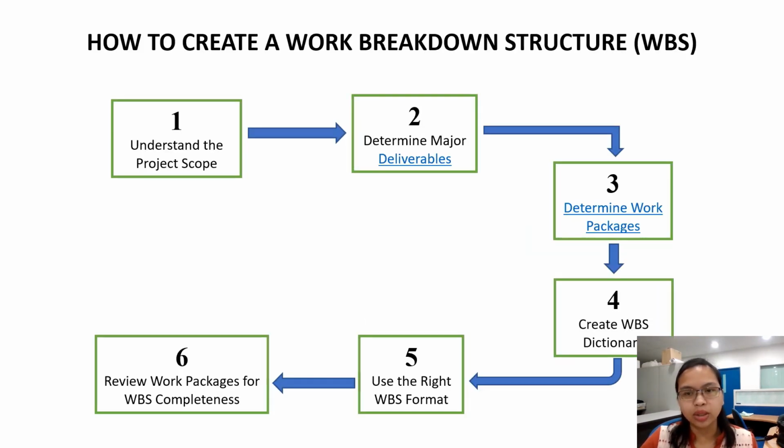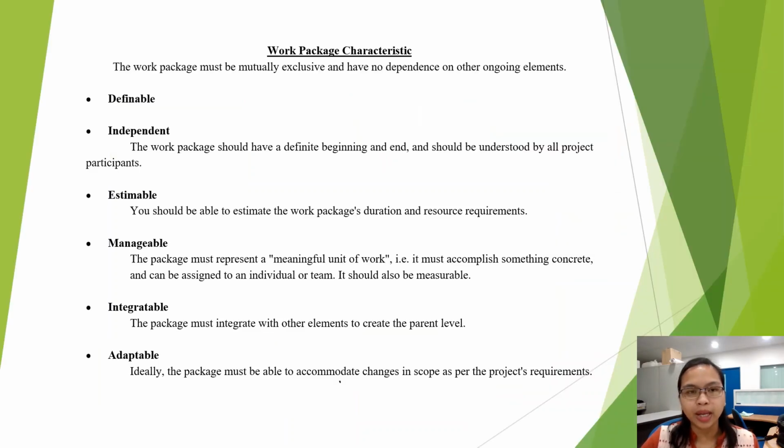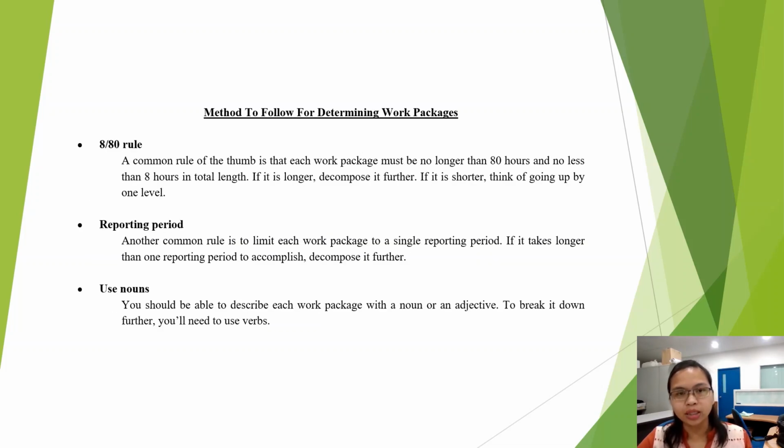The third, we must determine work packages. A work package must be definable, independent, estimatable, manageable, integratable, and adaptable. And there are a few methods to follow in determining these work packages. The first is the 8/80 rule, where the work package cannot be longer than 80 hours and not less than 8 hours in total length of working.